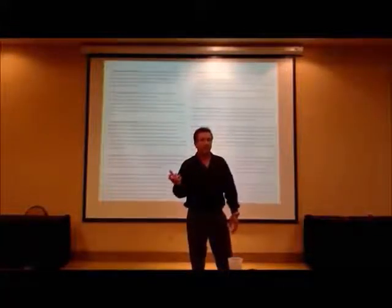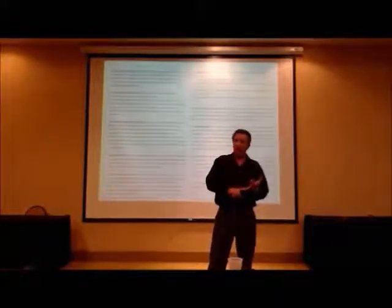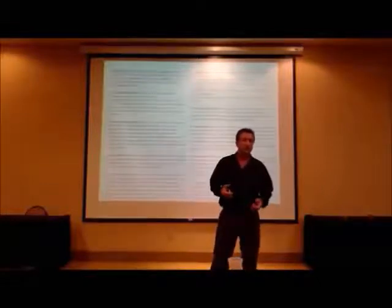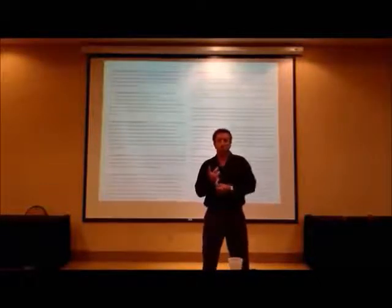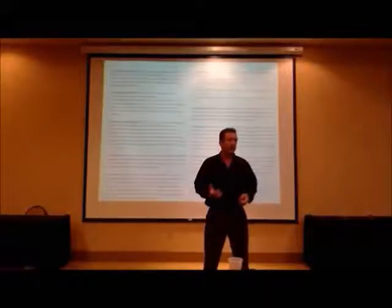How do you determine that? Number one, I figure out the cost of taxes, insurance, utilities, somebody to cut the grass, somebody to shovel snow, the interest on my loan with the points included. And I divide it out and I come up with that per diem figure. Now I have $5.